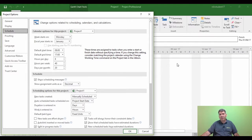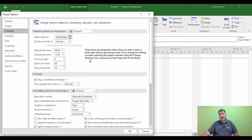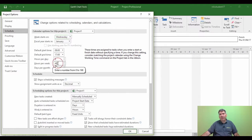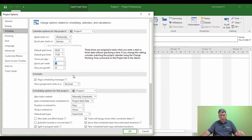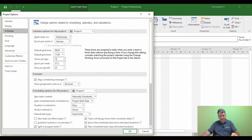For example, I might start on a Wednesday. Well if I were to change the Monday to a Wednesday now, and I'm not going to click OK just yet, and say now my working week was 37.5 hours instead of 40, it could be 37.5 and my working day could be 7.5 hours per day.